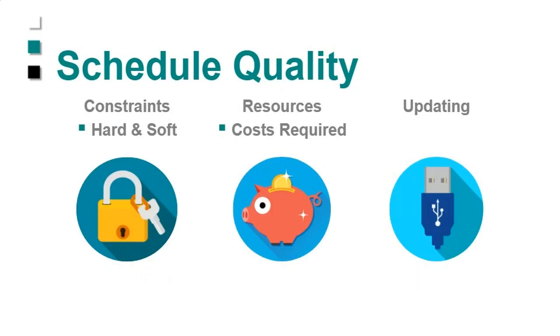You might want to be looking for some constraints. Do you have hard or soft constraints? And how many of those do you have? You don't really want to have your project so heavily constrained that the logic doesn't work as it should.